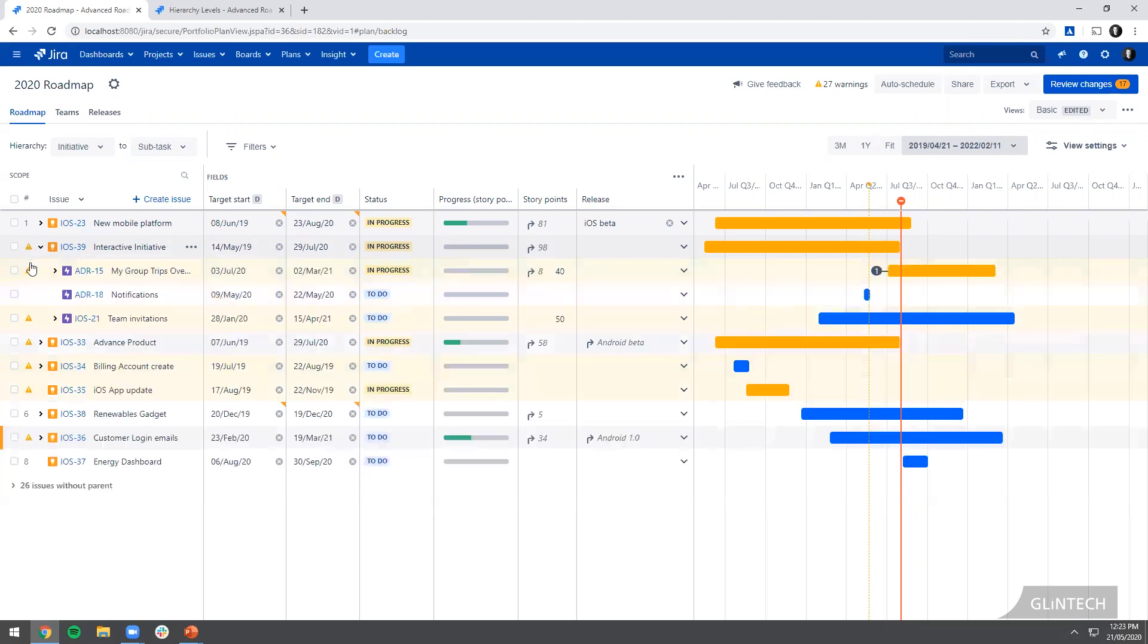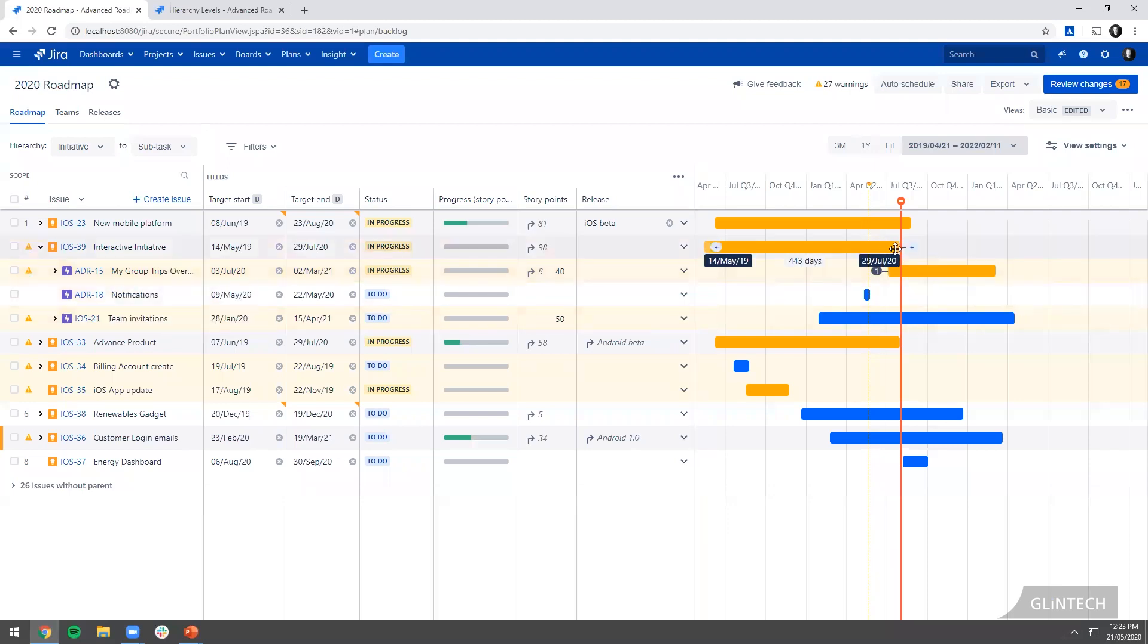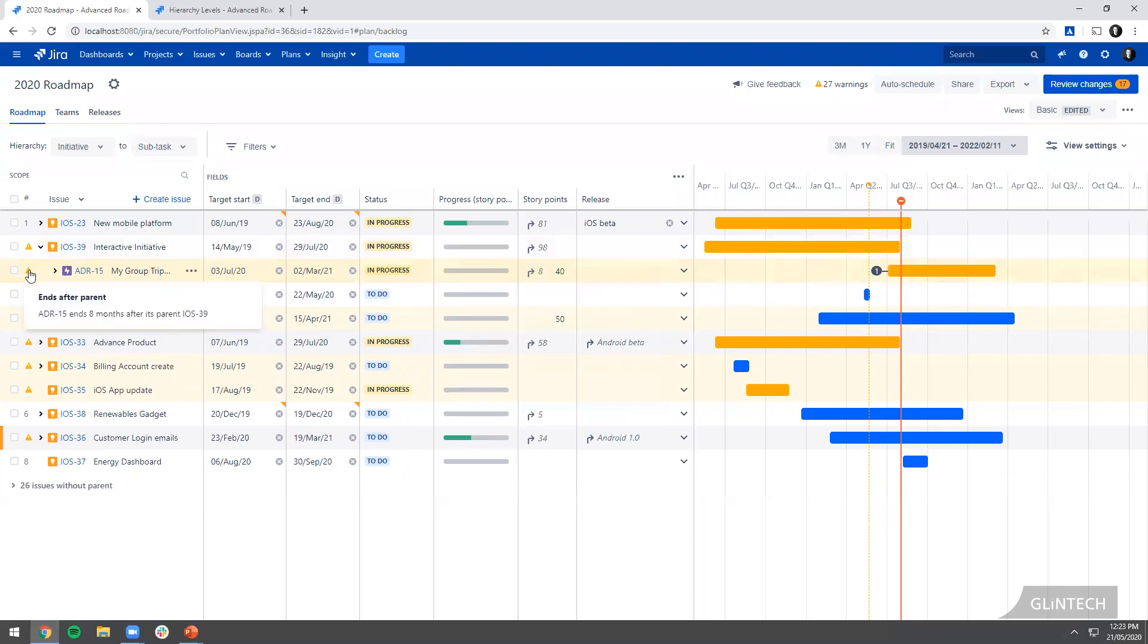We'll have a look underneath and we can see here ADR15, this ends eight months after its parent iOS 39. We can see that there on the timeline. Its parent is scheduled to finish then and it's further out. So that doesn't make sense.